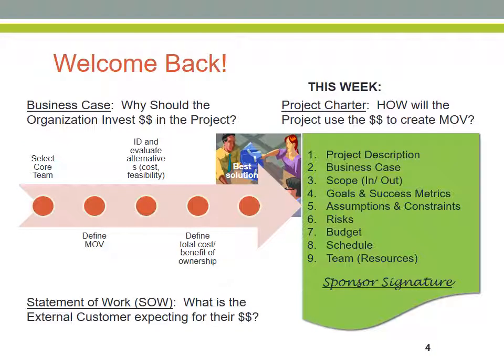In our previous module, we also discussed the nature of a business case. Essentially, a business case answers the question of why an organization should invest into a project. Here is how a business case comes about. First, a core team of engineers, managers, and senior executives is selected to define the measurable organizational value that is needed from a specific project or program.